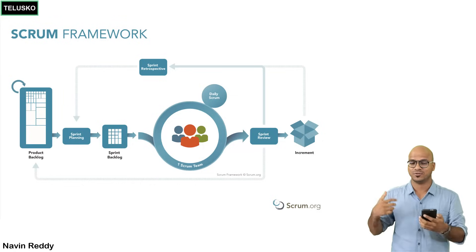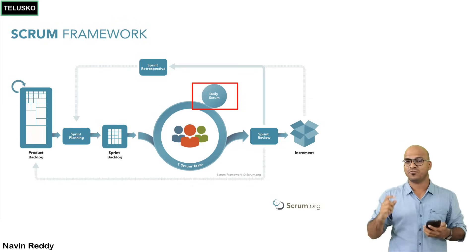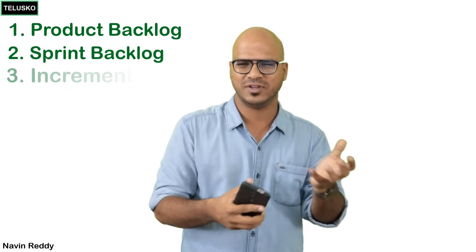To summarize the Scrum events: you have the Sprint itself, Sprint Planning, Daily Scrum, Sprint Review, and Sprint Retrospective. The Daily Scrum is a 15-minute stand-up meeting held every day — it's a stand-up so you don't waste time, because sitting down leads to slow-moving, extended discussions. For artifacts, you have the Product Backlog (all requirements), the Sprint Backlog (current sprint requirements), and the Increment (the shippable product).